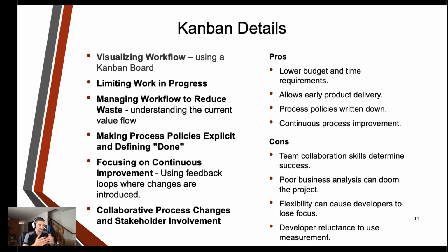Our tasks or our user stories are like sticky notes that move across the board as we progress through the workflow. This helps give a strong understanding of the work in progress and promotes transparency and collaboration. We want to limit the amount of work in progress. So Agile teams recognize the importance of limiting the amount of work in progress at any given time. So setting WIP limits ensures that we don't take on too much work simultaneously, which can lead to bottlenecks, delays, and reduced focus. It encourages the team to finish existing tasks before starting new ones, although there is space and room for simultaneous development.